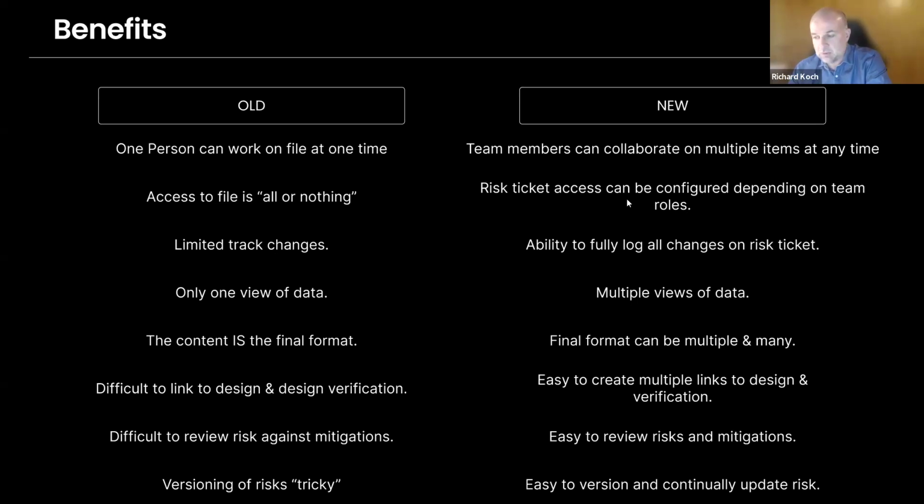And then, also in risk, you kind of have three major areas. You've got your 62366 usability risks, you've got your clinical risk, and you've got your technical risk, which I would put cyber under. And so, there are ways of giving ownership of sub-backlogs within the risks to different team members. So you can have one holistic risk list, which is segregated into different areas with different owners, and you can configure the tool chain so different people can manage different backlogs depending on their specialty.